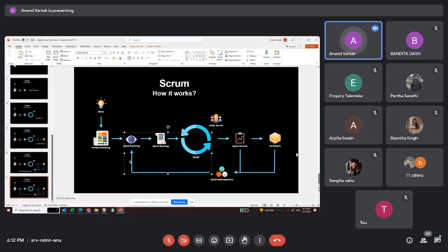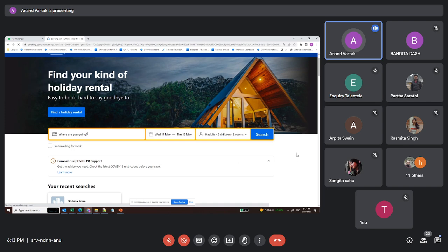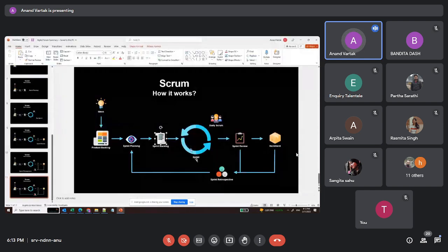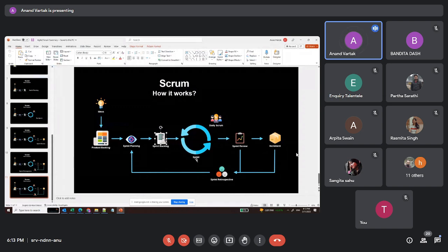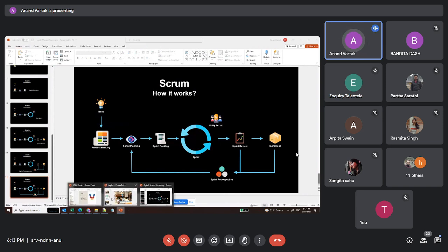When you do a sprint planning meeting, which is a kind of ceremony or meeting, you will define your sprint backlog: that in sprint one, in the next 2 weeks, I want to do only this box and these dates. Then you have subtasks for these two. To implement this and this, you will have two tasks. I have to do only this much work within a sprint. That is how you finalize the sprint backlog before going into your sprint.